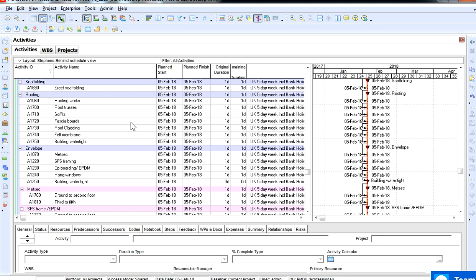If it's a flat roof, you install the flat roof, and then you put a hot melt over it, and then you put a layer of insulation over it, and then if it's required, I'm assuming it's concrete. So with concrete, you're probably just going to make good the concrete. I don't see any reasoning behind trying to get any damp proof or waterproofing on top of a concrete roof, because the frame will go right up to the roof anyway.